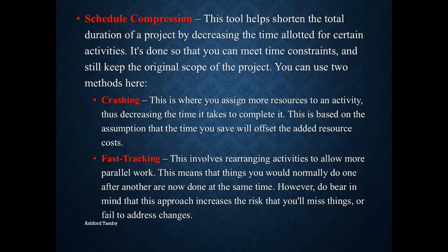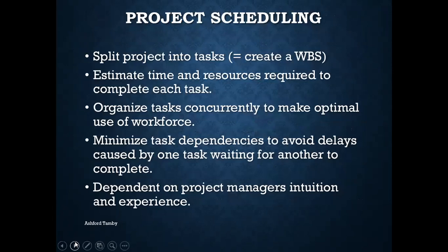So instead of waiting for one activity to finish in order for another one to start, you just start all the activities, right? However, a disadvantage of this is that it would increase the risk that you might miss things, because remember, everything is going on and you are the project manager and you have to ensure that you understand and know everything that's going on, because all the activities would be starting at the same time and going on at the same time, right?